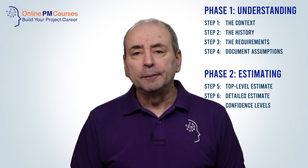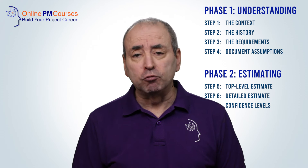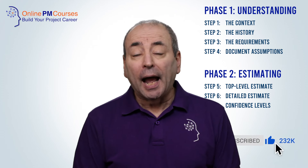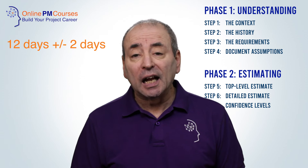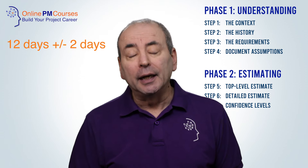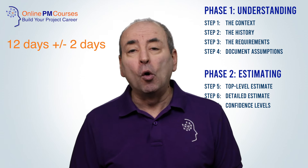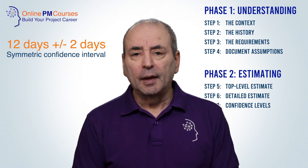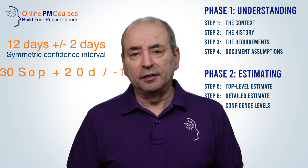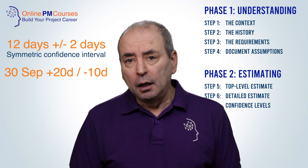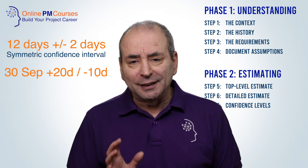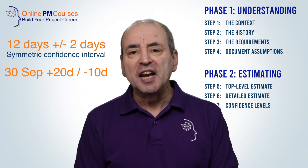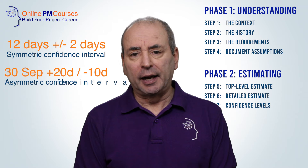We often express uncertainty or confidence as a range. A time estimate of 12 days plus or minus two days is an example of a symmetric estimate. A schedule estimate of 30th of September plus 20 days or minus 10 days is an example of an asymmetric estimate.